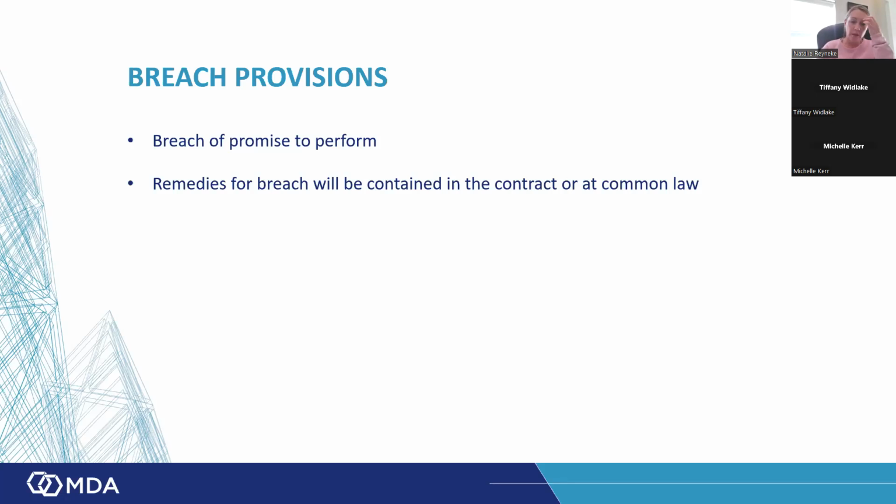Just on that topic about the remedies being contained in the contract, there are also remedies at common law. Obviously, South Africa is a common law legal system. So just because something's not listed in the contract doesn't mean that it's not available. Often you'll find the employer has a bespoke contract, and he doesn't have any remedies for the contractor should the employer breach the contract. He deletes them or doesn't draft them into the contract. That doesn't take away your rights.